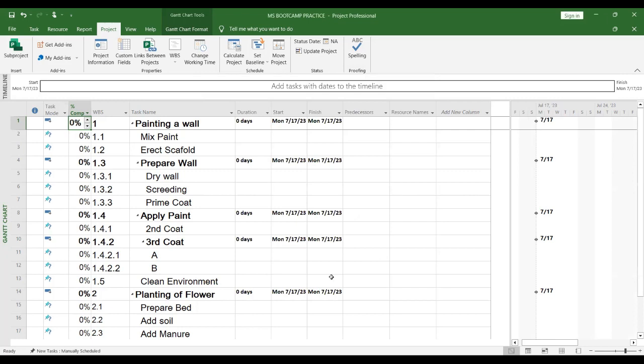As I'm scheduling my project, if I schedule anything on 25th and I put 4 days, it will skip 26 that I put only as holiday. It will skip 27 put as holiday. It will skip 28 and it will count 25th as day 1 and go and count 29 as day 2. All those settings, you need to do it at the back end.